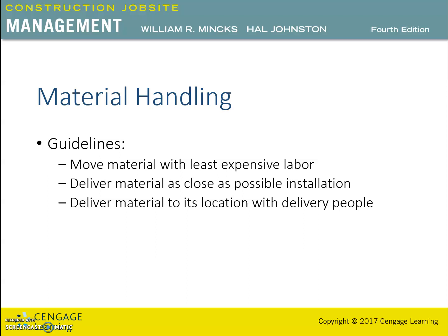The delivery truck often comes with a boom or fork attachment that assists in the placement of the material. For example, drywall is normally delivered and stocked by the delivery crew. The crew will, as directed, put portions of the order in specific rooms and on specific floors. They also can use the fork boom on the delivery truck to deliver drywall to a second floor opening if desired.